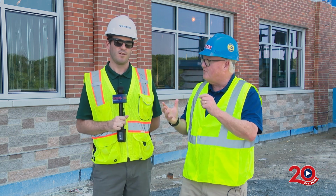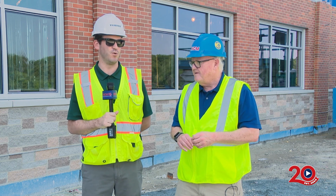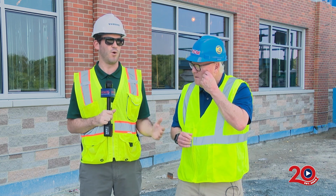Well, let's just talk about this for a second. School's out. So one of the obstacles, for lack of a better word, is having students around and the building being active. What does this allow you to do? Sure, so yeah, it's a busy summer coming up for WT Rich. They are going to be extending the construction fence that we have currently now to basically the limits of Washington Street on both sides of the existing building. We'll basically be taking the north and south parking lots into the construction site for the summer.